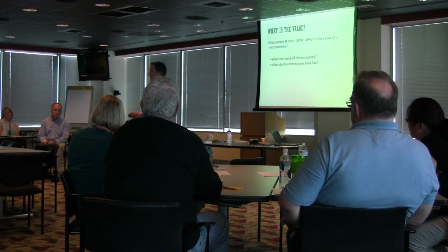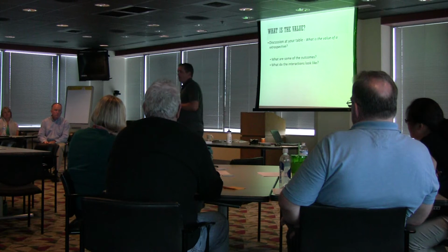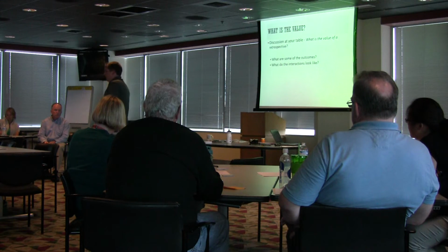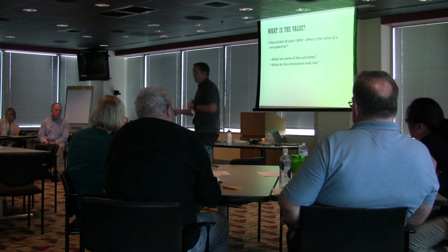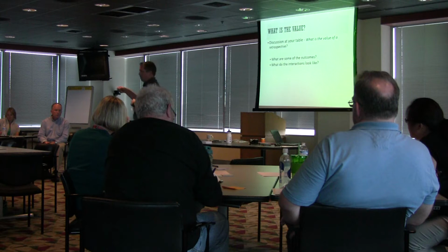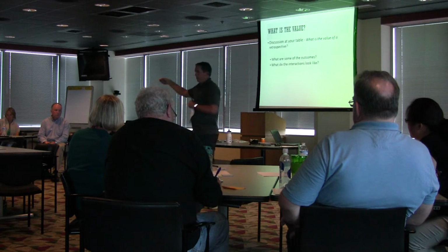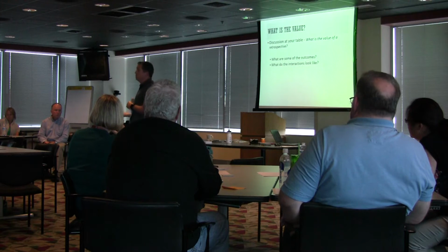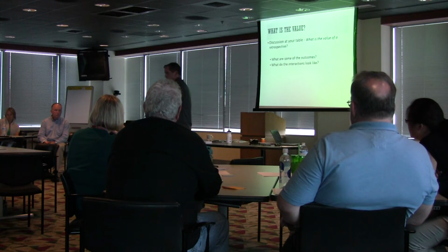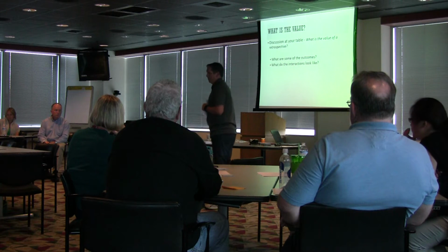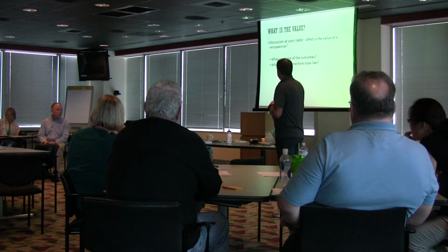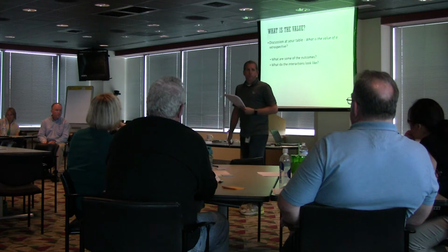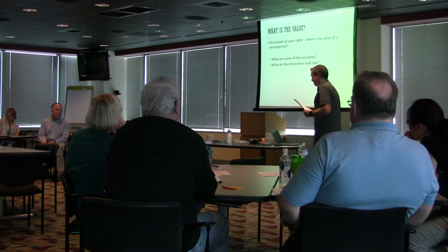Right? So be specific so that you know you're either on target or not, and then measure. So remember we talked about the other day, yesterday, whatever day that was, someday, about the scientific method, right? Have a hypothesis, devise an experiment, know what result you're trying to hit, run your experiment, measure it. Did we achieve what we said, or what we hoped to achieve? If not, make another adaptation. Does that make sense? So make it actionable. What do the interactions look like in a retrospective?